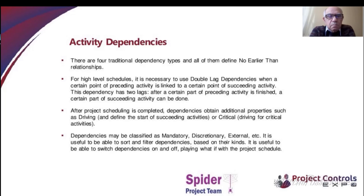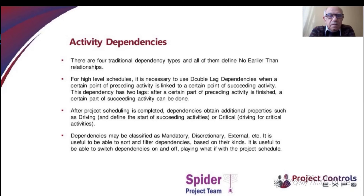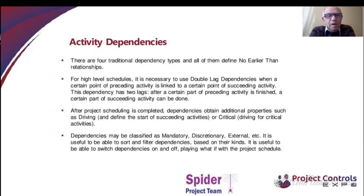Spider Project supports all traditional methods and tools, including the four traditional dependency types: start-to-start, finish-to-finish, finish-to-start, and start-to-finish. But we also have what we call double-leg dependencies or point-to-point dependencies. You can connect a certain point of a preceding activity with a certain point of a succeeding activity, meaning you shall do some amount of work on the preceding activity before a certain part of the succeeding activity can proceed.